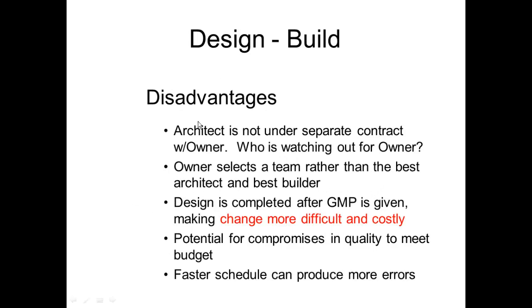Again, disadvantages of design build, I put in here. Design is completed after the GMP is given, making change more difficult and costly. Again, scope creep. The architect is not under a separate contract with the owner. Who is watching out for the owner?